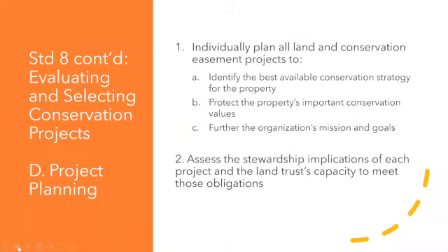And think of that as opposed to an easement that is 450 acres, irregularly shaped, bounded by several subdivisions that are under development or have new people moving in, and there are reserved rights to build 3 homes and recreational facilities in floating areas of the easement, right? None of us want that easement, but if we have it, we know that that easement has a high likelihood of requiring substantial stewardship expenses in the future.